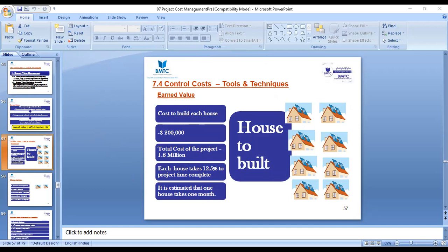You will arrange transportation, deal with a logistics company, and ask them, can you keep this for 10 days? We'll pay the rent. So you're adding money to your budget. And the project is getting delayed for the next 10 days because you can't do any work outside. So you will add the duration to your baseline.